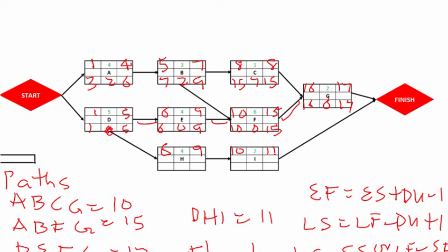And so going backward, now the same concept you use when trying to identify the early start of activity A. Now the activities on the starting line usually have the same early start date, while the activities on the finishing line usually have the same late finish date. So that means that the late finish of activity I will give us 17. So if this is 17, using the formula, this will be 17 minus 2, 15 plus 1, 16. And so the float is 6.